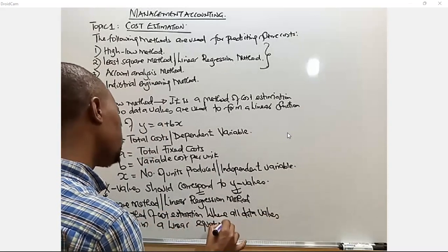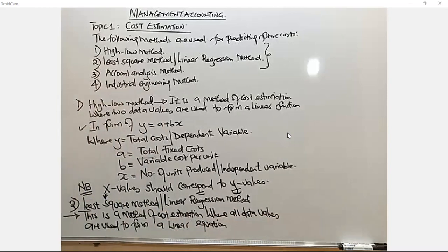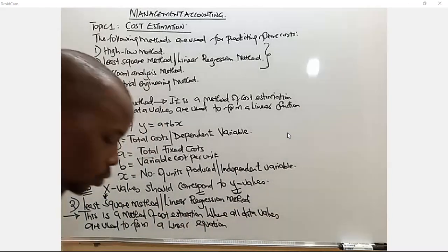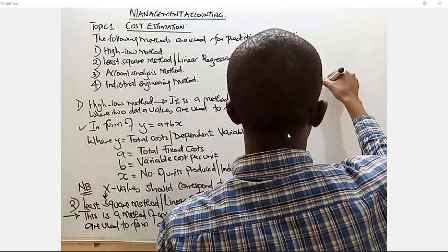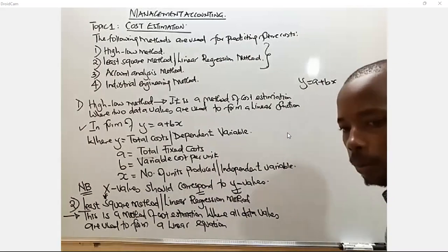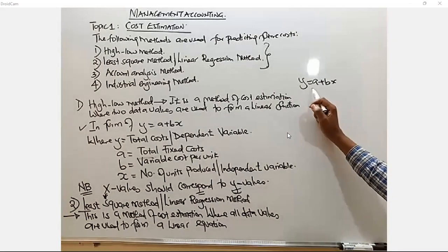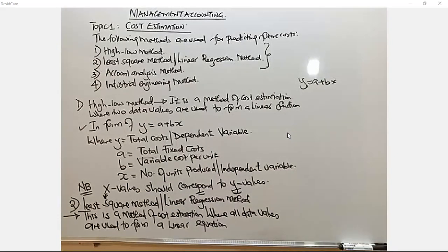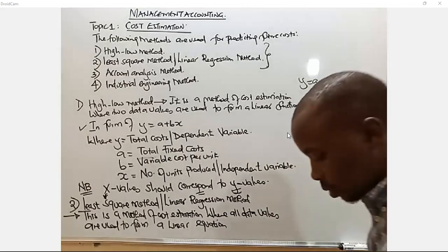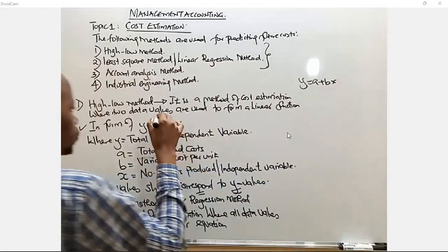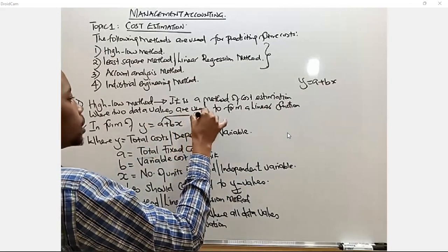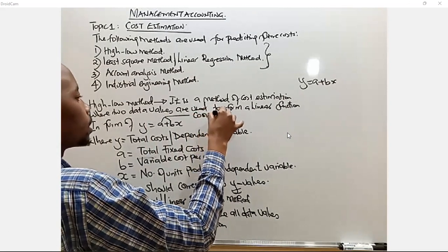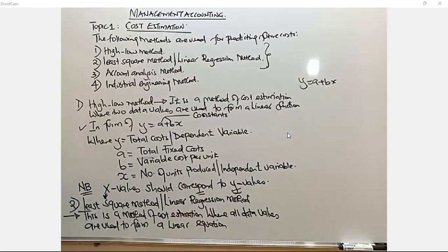But in this case, you can tell me, Mwalimu, when I'm using the least square to form my y is equal to a plus bx, let me just write here, y is equal to a plus bx, because that is the form of the formulas that we shall form. Then you can tell me that we normally use formulas to get what? I forgot to talk about it here. These two, a and b, are basically called constants.